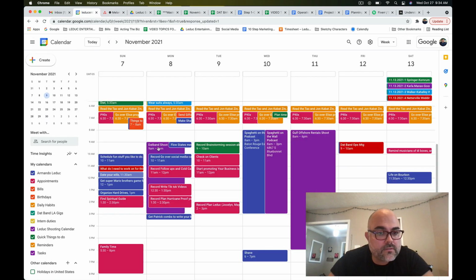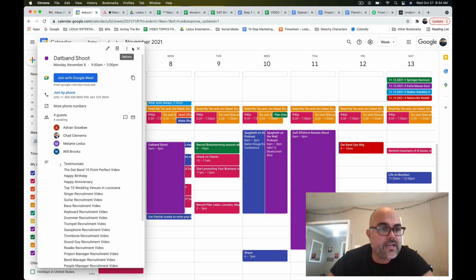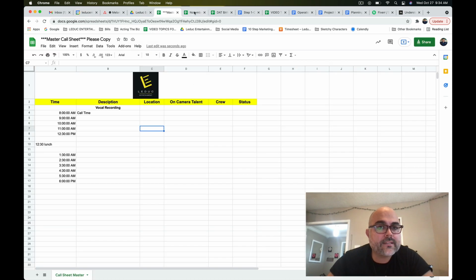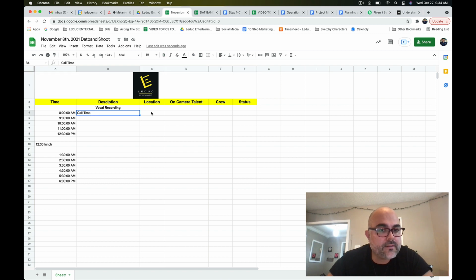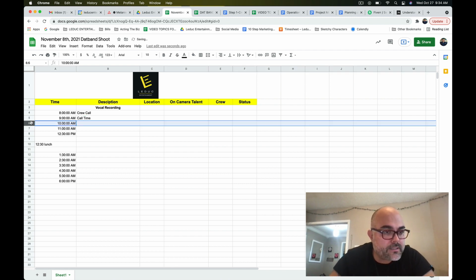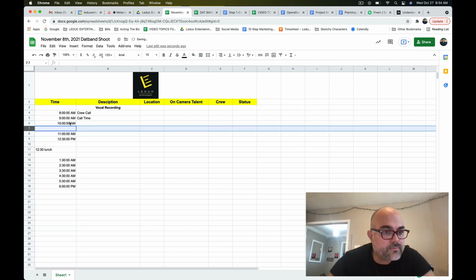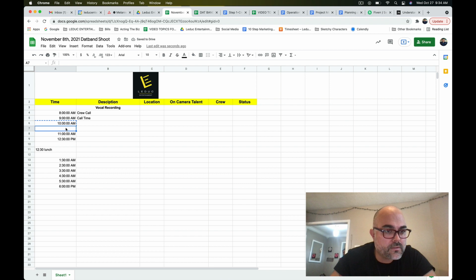All right, so we're in here, November 8th shoot. And we're gonna start at 9. So if we start at 9, we know that the call time for crew is always 8, right? And we'll call this crew call. Crew call time. And then we could probably insert below. We can start at 9:30 a.m.